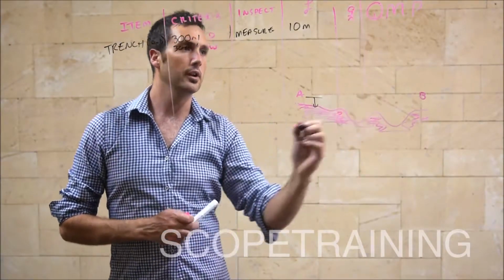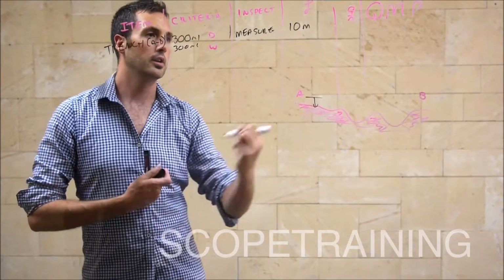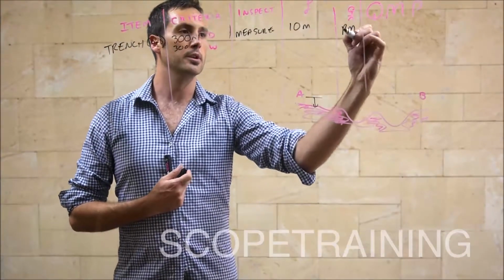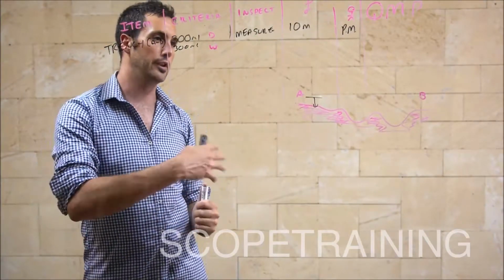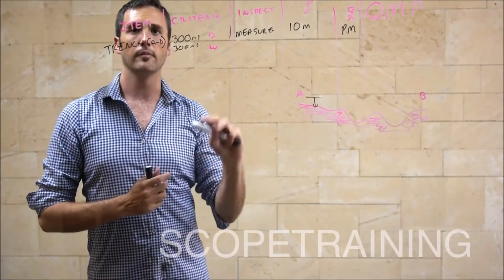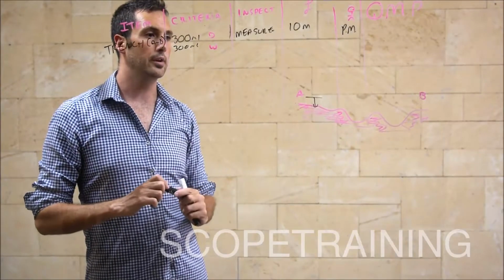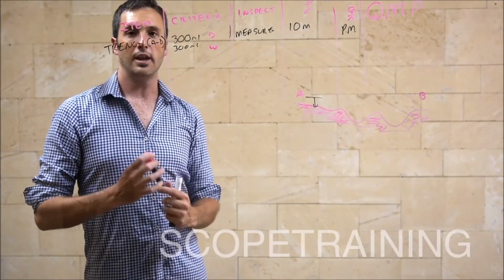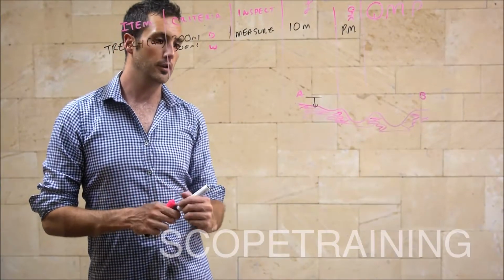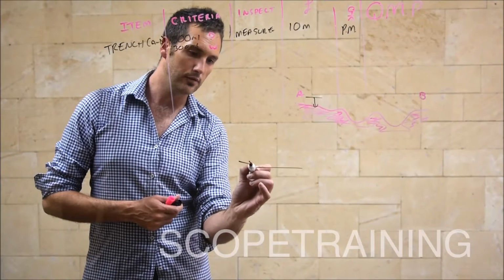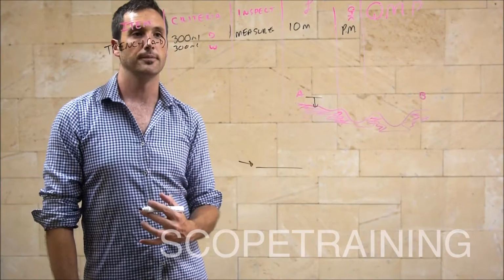And just to make sure it gets done, I'm going to make someone accountable to make sure that this measurement occurs, and we'll make that the project manager. I like to make the person who inspects it a different person than the person who's actually done the work. It's just like scuba diving. The buddy system works out quite well. And you can do this with all the aspects in your work breakdown structure. Anything that you can quantify, I think you should quantify, just to make sure you've got parity, you've got that line in the sand, and then you can objectively look at it and say, has that work performance met the standard that I want?